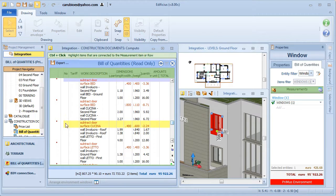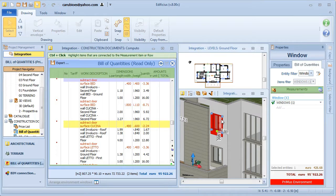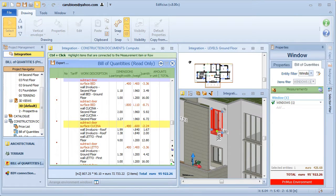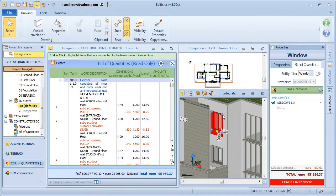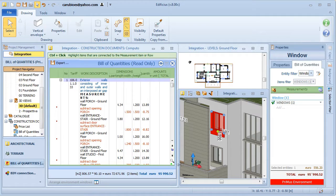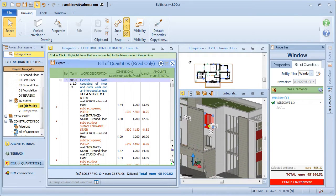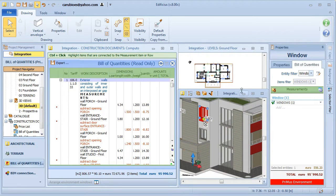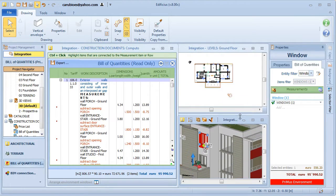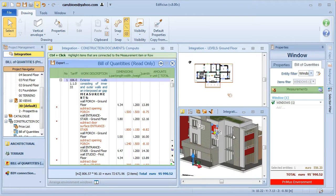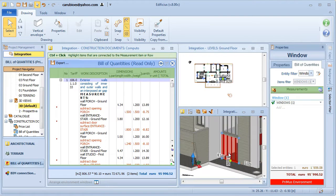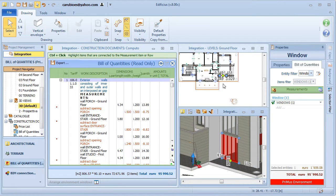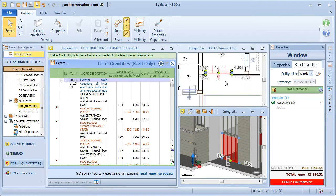But what happens if I modify the model? Well, even if I need to make changes to the model at this stage in the design phase, this means all entities will be dynamically updated in the cost estimate too, and with the automatic recalculation of all quantities and amounts.